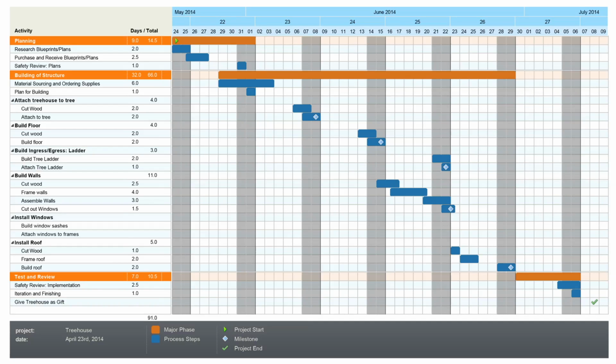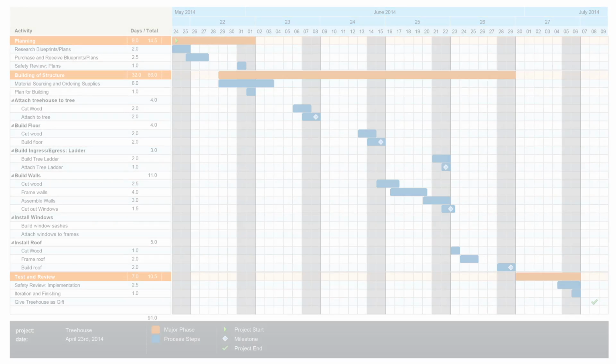In order to apply step 2 and select our time block for our project, we first looked at the overall length of our project, which is going to be 6 weeks. So our options for time block are 1 week or 1 day. And for this project, we are going to select 1 day.